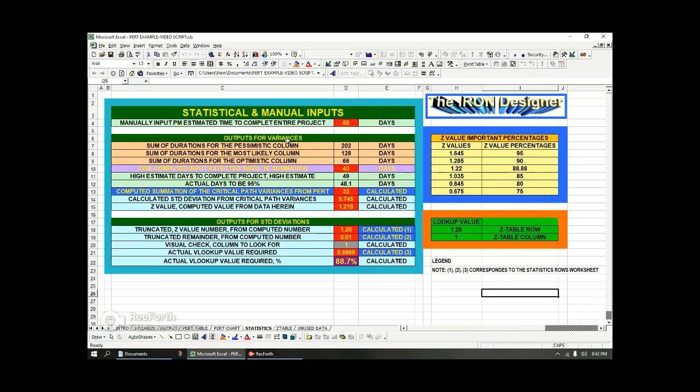All right. Now we've seen that the summation of the durations is different, but many of them are in parallel, so it's not really a direct summation. So in order to be 95% confident, we would need the CPM to be 48 days, okay, for a 95% confidence level.